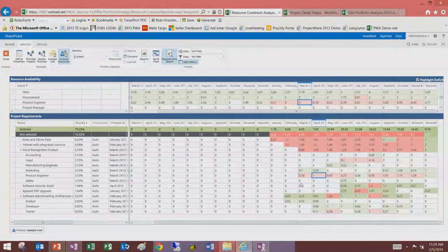Well, we're looking at the roles, remember. So we have a certain number of FTEs available, and then we're trying to make a selection based on the total FTEs we have. Where are our gaps? We either need more people. So we have 5 analysts available, and in order to get the work done, I have to either shift it out or add more resources to that role. So it's based on that role.